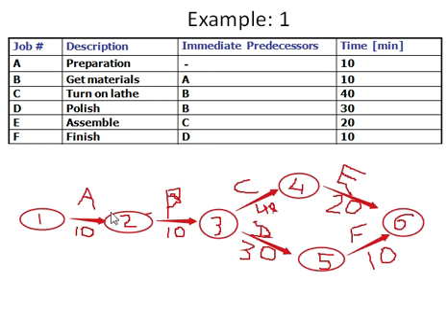So it is very important to observe the critical path and manage the resources to avoid any disturbance to those critical activities. Otherwise, any mismanagement in critical activities will lengthen the time required to complete the project. I hope it is clear to all how to find a critical path from this simple example.